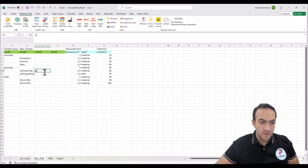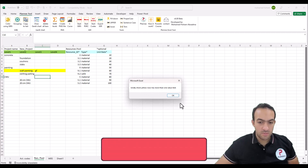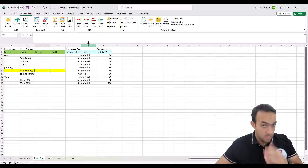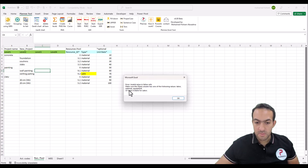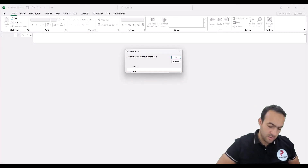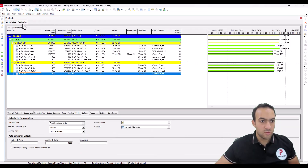Let's run with some mistakes. If I have something at level three on the same line and try to export, I get a message: 'Please check the yellow row' — that means you have to remove it. Then run again and you get 'Invalid type' — you have to use labor, material, equipment, or leave it blank. For labor, I will export now.